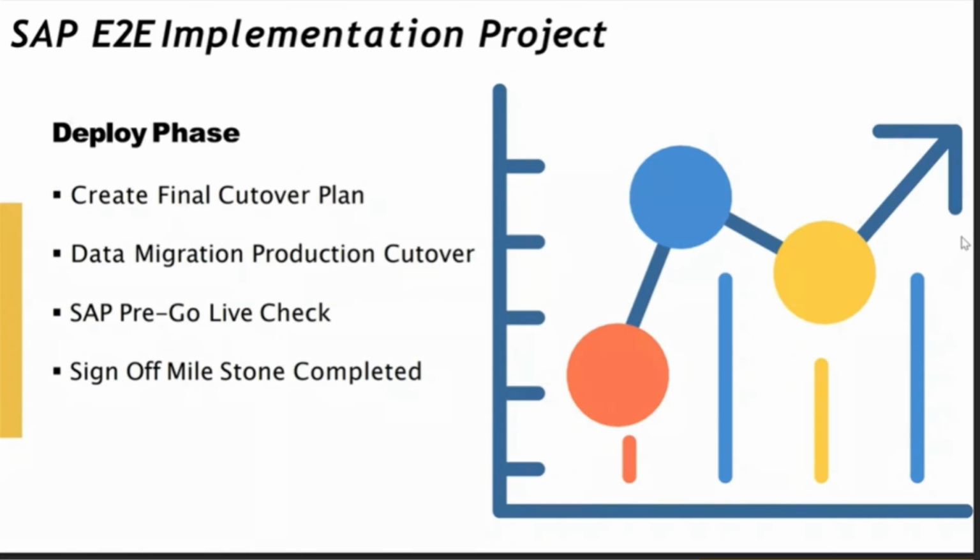Let's say I uploaded in the production server, I have uploaded 1 lakh records, and suddenly what happens? Some material is missing. There are some bugs, and they are telling us that the uploaded values are wrong. Suddenly the client itself says that this was mistakenly given by us. So now the whole data is corrupted. In this case, what SAP suggests is that don't upload directly to the production server.